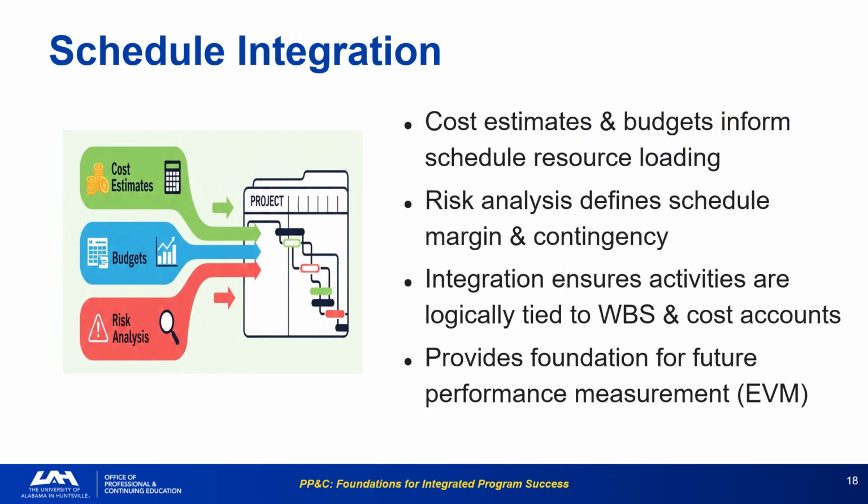We focus specifically on how integration applies to developing the schedule. Cost estimates inform the resources loaded onto the schedule, and risk analysis defines the necessary schedule margin. Integration ensures every activity is logically tied to the work breakdown structure and associated cost accounts. A well-integrated schedule is the required foundation for all future performance measurement, including earned value management.